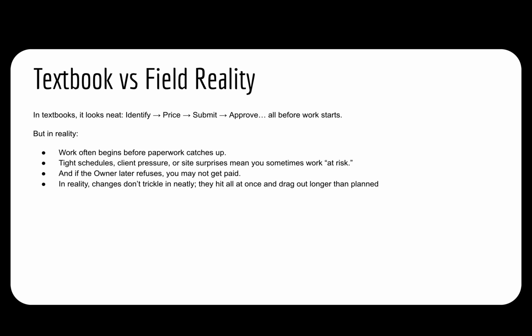Textbook versus field reality. In textbooks, the workflow is really neat. You could identify it, price it, submit it, and approve it all before the work starts. But in reality, work often begins before paperwork catches up. Tight schedules, client pressure, or site surprises mean you sometimes have to work at risk. And if the owner later refuses, you might not get paid. What also happens is that changes don't trickle in neatly. They hit all at once and drag out longer than planned.